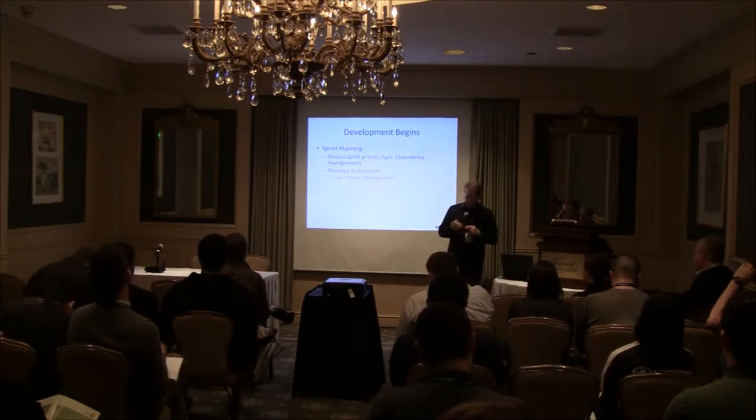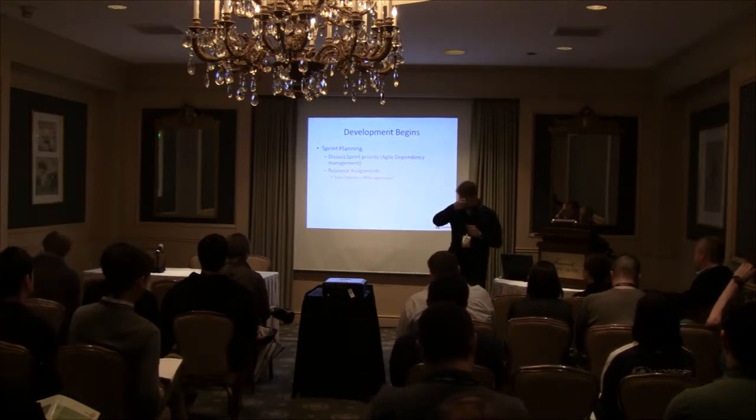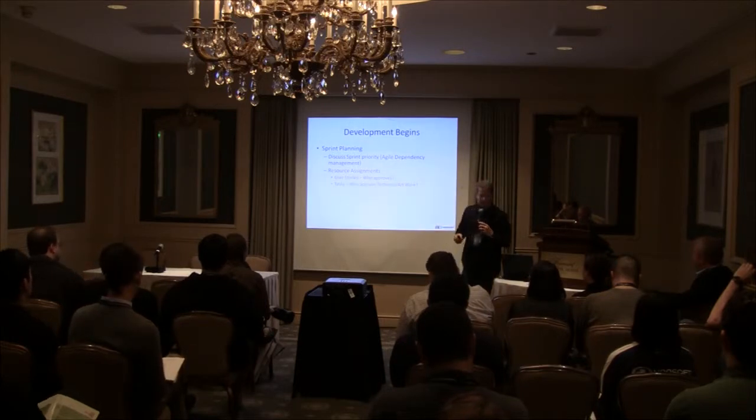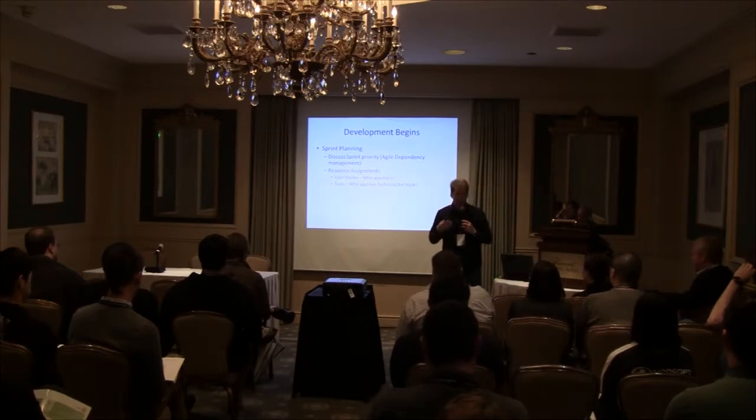When we talk about the resource assignments, I like to make sure that in the sprint planning session we put a resource on every item. That way when QA starts to look at, okay, this feature's in development, we start seeing some check-ins going on, they know who to get this information from.